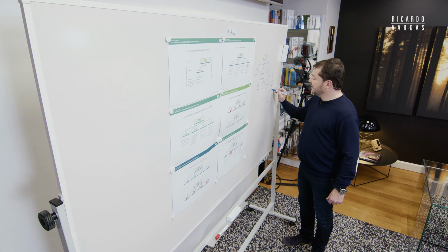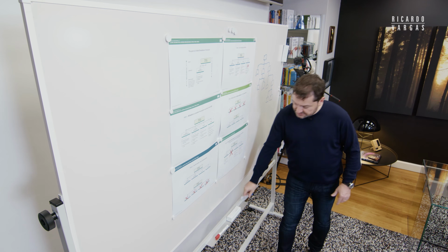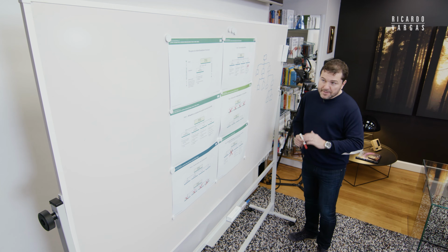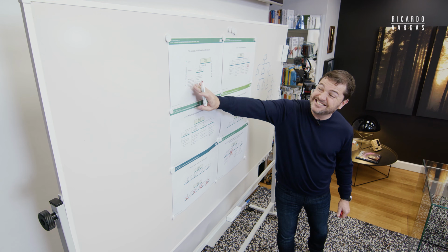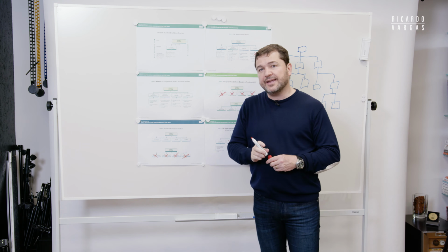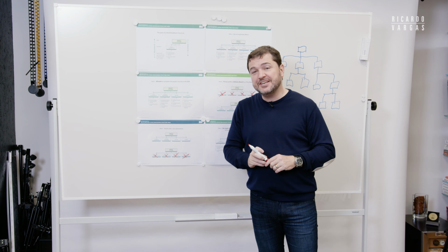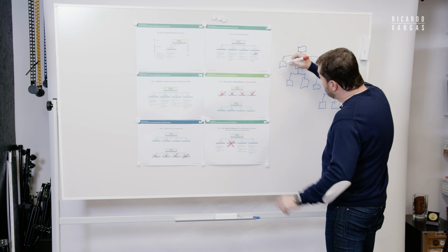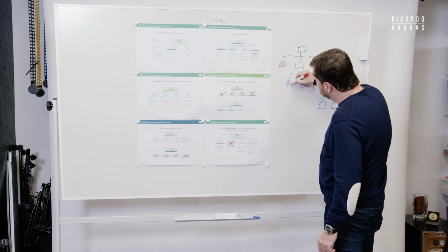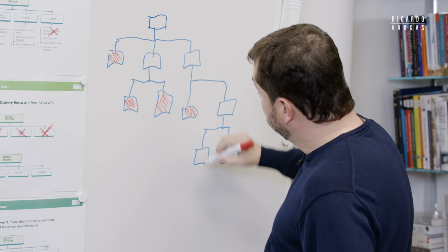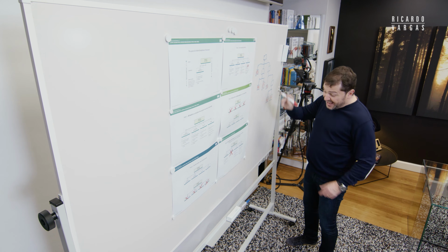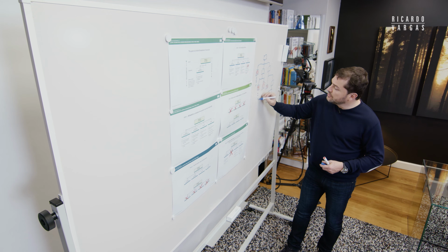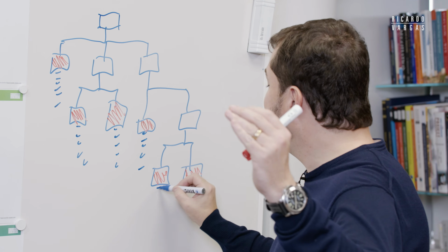I ask you to tell me how many work packages are in this view. A work package is the smallest element, the lowest level. The best way that I explained it in the video that I did many years ago is that it's the box without any box below. 1, 2, 3, 4, 5, 6. And in every work package, you will have a task list with the verbs, and you have a WBS dictionary and everything else.